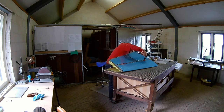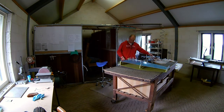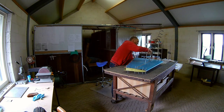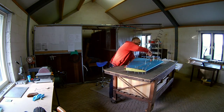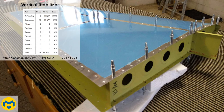So this is the second day I work on the vertical stabilizer, and it's already almost finished. I'm very confident that next time I can finish the vertical stabilizer, which will be quite an accomplishment. I have to think about starting to order the wings, because there is an 8 week lead time on wings, and after the vertical stabilizer I only need to do the rudder and elevators. Today I worked for 5 hours, set about 115 rivets, had to drill out 2, which makes a total of 774 rivets for the empennage. I keep the statistics.